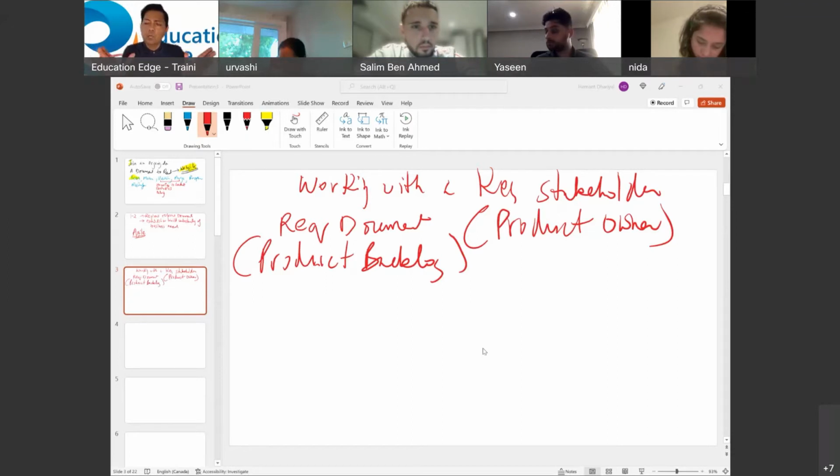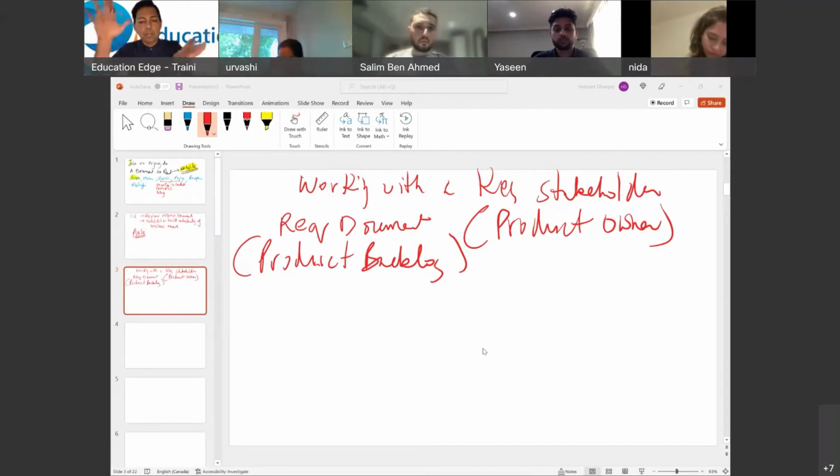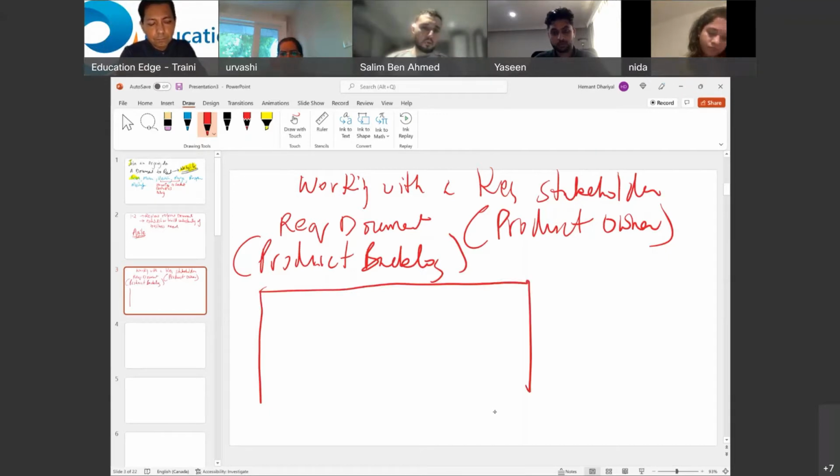A product backlog could be a very simple spreadsheet. For today, let's just say a product backlog is a very simple spreadsheet where you document stakeholders' needs or requirements. So the requirement document in agile is called the product backlog, and it is something you start doing at the beginning of the project. And this product backlog would contain an ID for that requirement, the requirement,